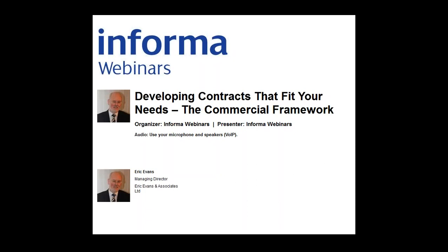The second point on this list, what risks and opportunities do we want to manage? You have to take the view that a contract is a risk management tool. We have to sit there and think about what could possibly go wrong, and then consider, do we need to put something in the contract which will either prevent this happening, reduce the probability of it happening? If it does happen, reduce the consequences, or give us more notice that this is about to happen so we have an opportunity to do something about it.